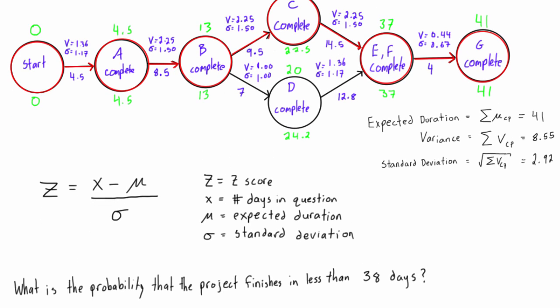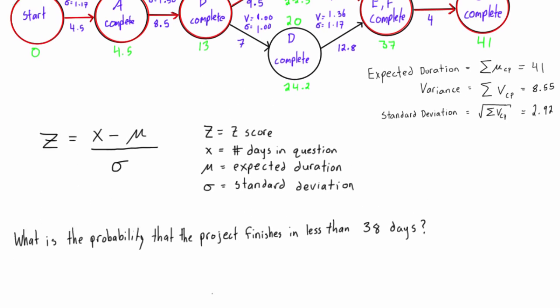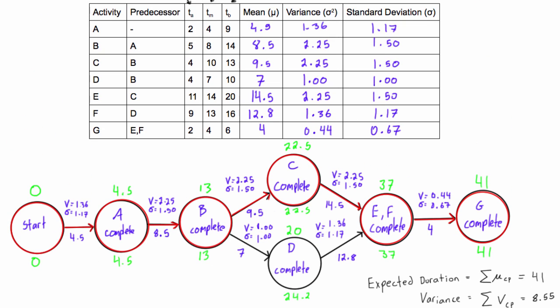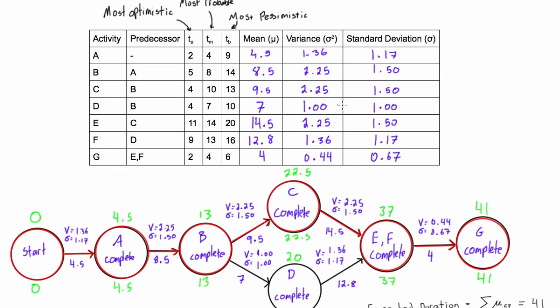Moving on, what we want to do now is find out what is the probability that the project will finish in less than 38 days. So we know that its expected duration is 41 days, but we also know that expected duration isn't a guaranteed thing. If we look at the expected duration of any individual activity, for example activity A, its expected duration was 4.5 days.